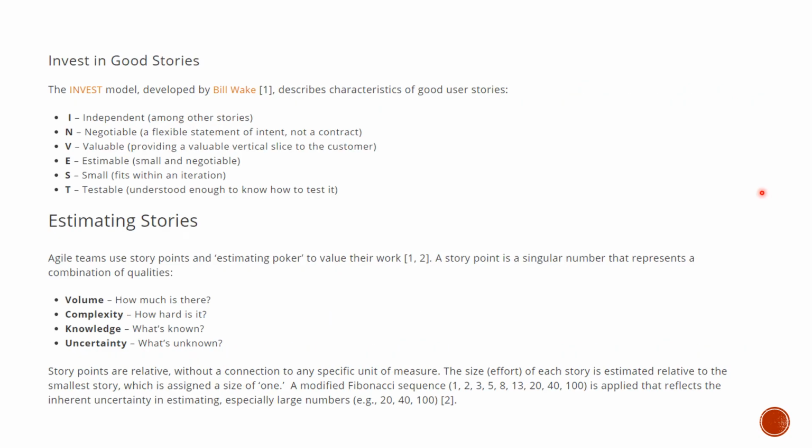Another aspect of writing a good user story is using the INVEST model. Invest in good stories. The INVEST model was developed by Bill Wake from extreme programming. Alright, let's look at what INVEST refers to. The first letter, I, stands for independent. It should be independent among other stories.